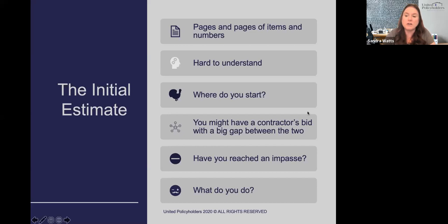But you need to look at a cost benefit, okay? How much is it going to cost you to get that estimate? A lot of the going rate's about 1.5% for the people who are used to doing it for insurance companies, okay? So you might find somebody who's a contractor who might be able to get it through. It doesn't mean that they can't, but these are the people who do this for a living. They write estimates for you to submit to your insurance company. They're general contractors.